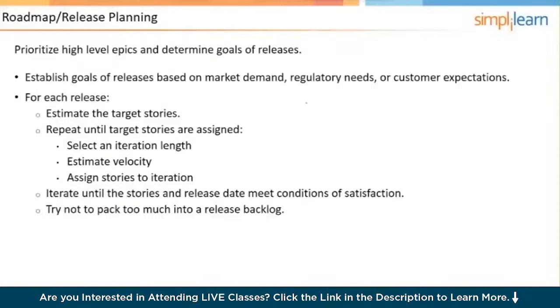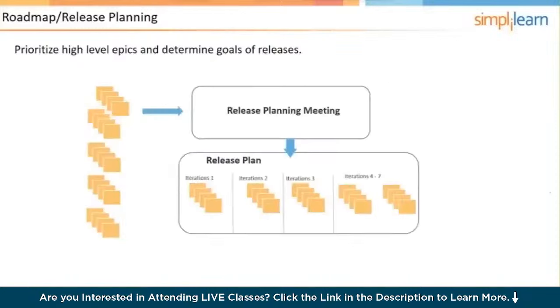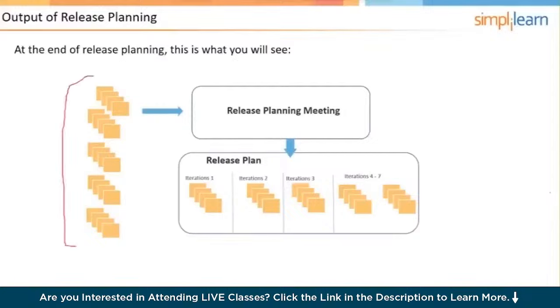Okay, so here's a bit more about release planning on this slide here. You've got the product backlog here on the left, and then we might come up with a release plan, which could be flipped and could be looked at horizontally. And you probably plan about 3 releases in advance, or at least you're doing more of the detailed planning on that.